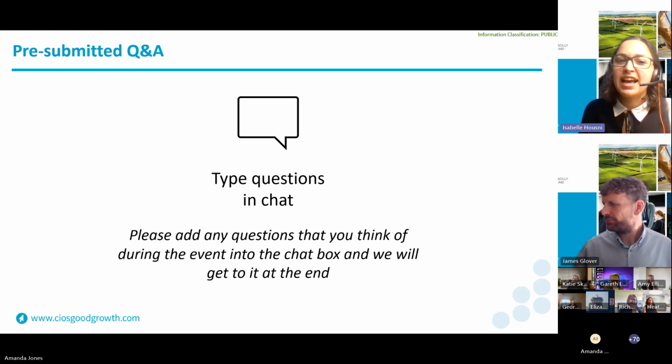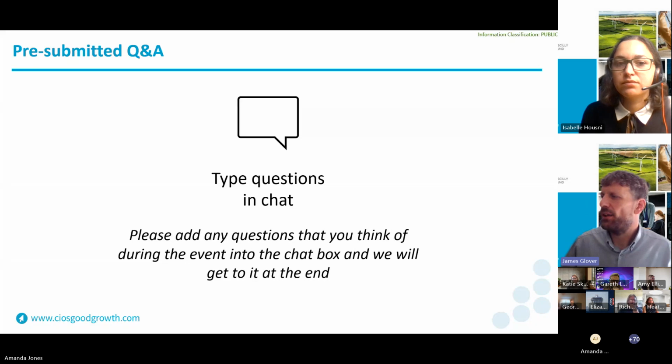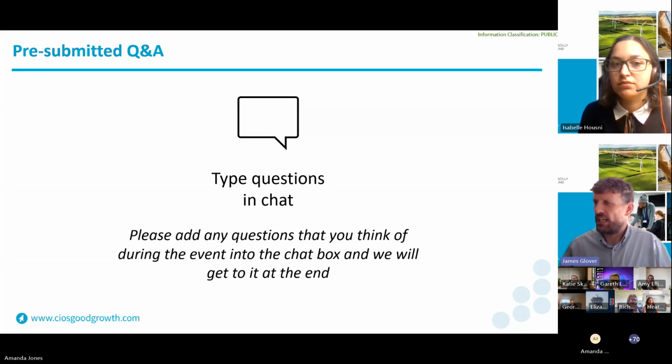Thank you. So question 10, how do you handle retention on capital projects? Yeah, we can only pay claims when all project costs have been defrayed, so spent and tracked through. If a project has any unpaid capital retentions by the grant funding agreement end date, these would not be eligible for grant. So please ensure all eligible costs have been fully defrayed by your project end date.